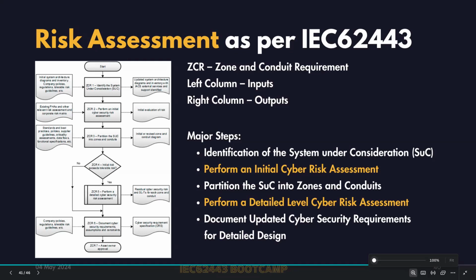As a risk assessor, it is your duty to conduct the assessment. There will be one facilitator who conducts this risk assessment. All the stakeholders will be involved in this risk assessment workshop. As a facilitator, you will run through each of the risks for each of the assets, and then everyone has to agree upon the risk rating.